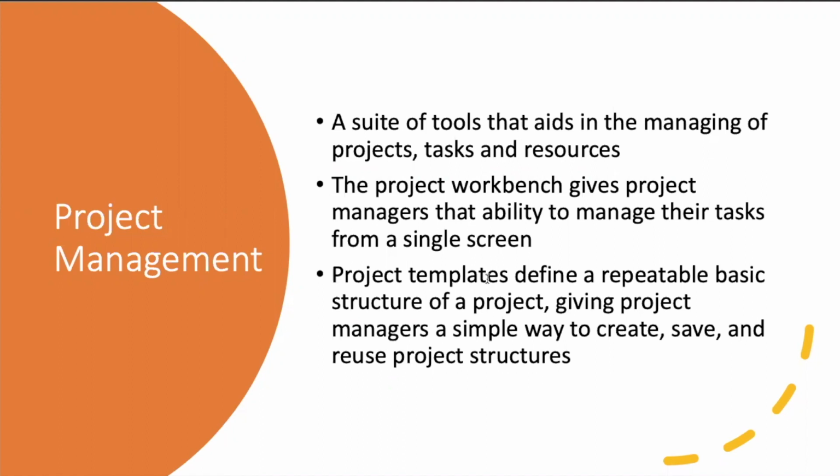That's why I prefer the actual process of going from idea to demand to project. But when it's sold, people are thinking that they're going to be importing their MS Project schedules in here, and that becomes very time consuming. So just be wary of that. If you hear that they want to integrate with Microsoft Project, that's going to be a hurdle in itself.